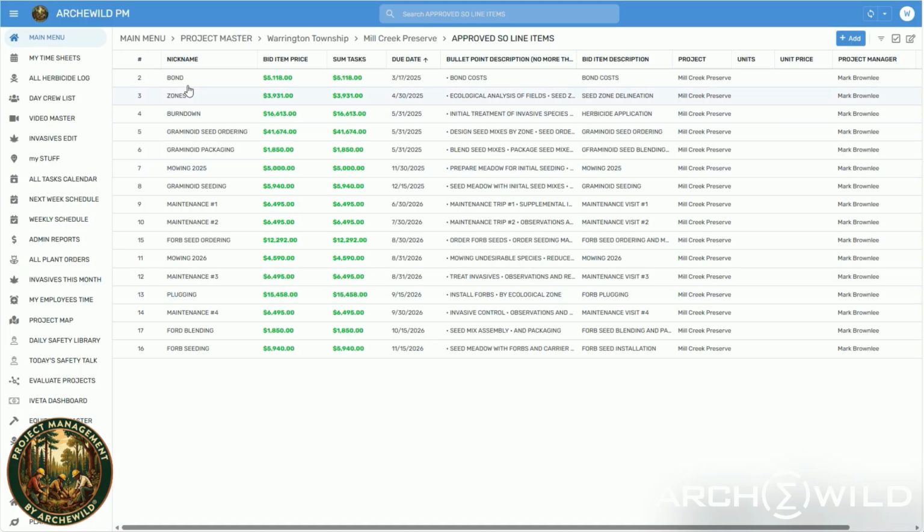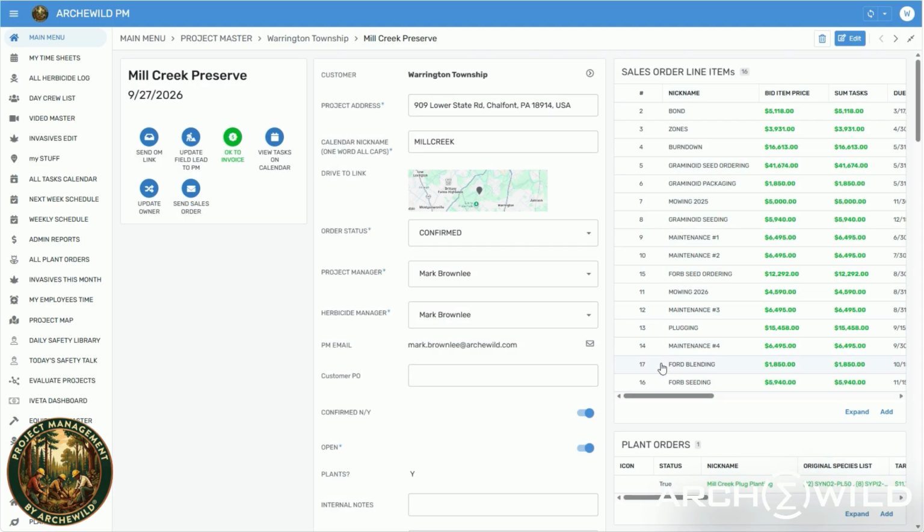All right, so that is the second task after you set up the project and the contacts. You create the project and define these sales order line items. You don't do really anything until all of that is set up and you look at it. Yeah, it makes logical sense, and whatever the contract amount is, it's distributed across all the items. Once you have that, though, you need to do some more things. So that's a sales order.